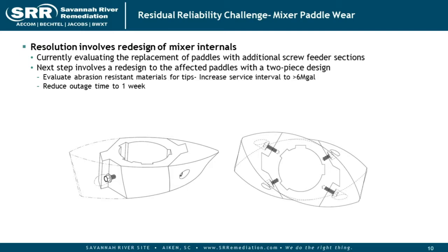So this work has been pursued in consultation with the SRNL National Lab. We have mocked this up on rapid prototyping machines, and they are now proceeding to actual fabrication of the metal paddles. I think the first set of these was fabricated last week. They're going to make a total of 6 pair for us, and we will then take them to our spare mixer and install them on the spare mixer to prove that our maintenance mechanics can actually do this replacement in a clean area before we would ever ask them to do it in a contaminated environment.